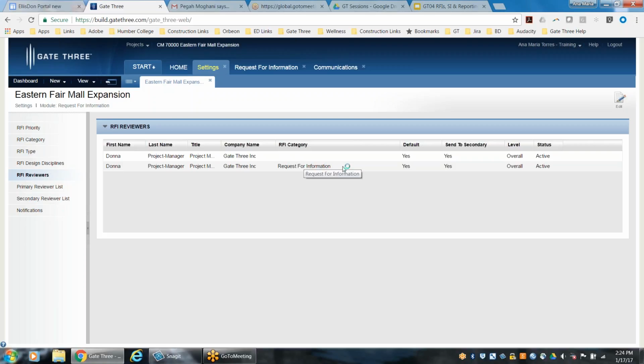So I'll just use you guys. Melissa and Chris, if you were both project coordinators or assistant PMs, ensure that your name is listed as an RFI reviewer and associated to Request for Information. That way you are covered in the event that Donna, your project manager, is away.